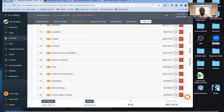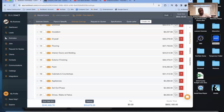When you're a subcontractor — like Mr. Scott who does a lot of decks — even on a deck I would do a line item breakdown: how many 6x6 posts, how many hangers, how many 2x10 floor joists, how many deck boards. I would even try to calculate the number of screws on those deck boards. That gets you really tight on your numbers.